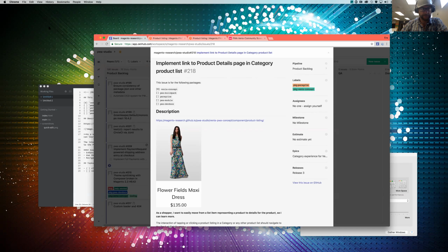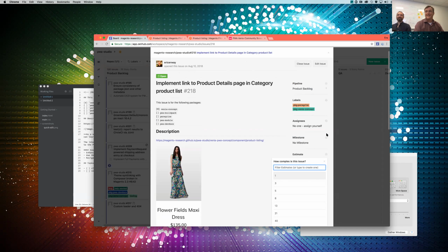Yep, according to this task, I would say not so complicated. Which numbers actually do we have there? Again, 1, 2, 3, 5, 8, 13. So 8, and just for Carl's benefit, 8 is essentially a full sprint, right? Each increment is a day, knowing that there's not really a 10 in there because there's always administrative.